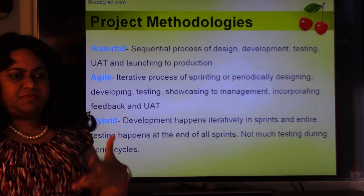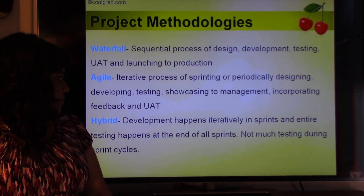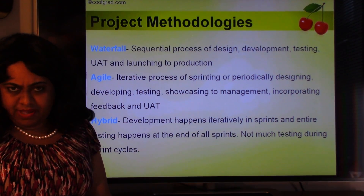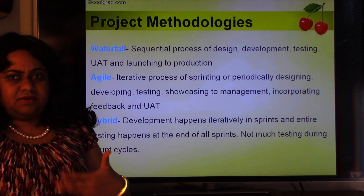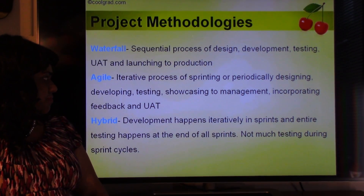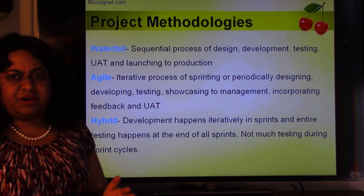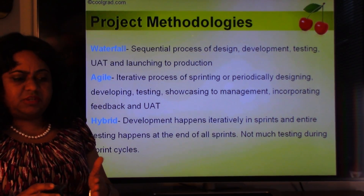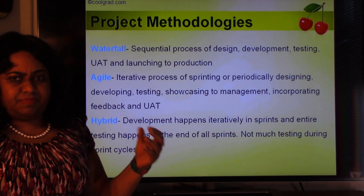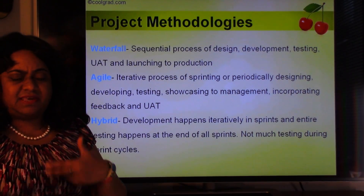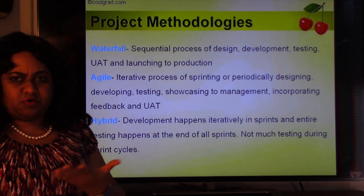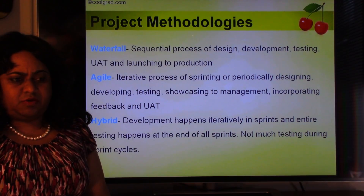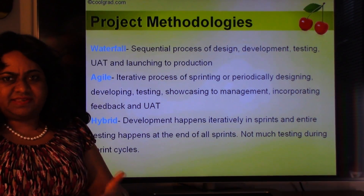Agile methodology is a recently developed methodology that is all iterative — the entire project implementation is done in cycles. There is periodic showcasing and periodic incorporation of feedback from the product owners. In an Agile project, there is something called a sprint, which can be one, two, three, or four weeks long. In one sprint, the team does some design, some development, some testing, and showcasing. At the end of the sprint, there is a demo to the business team so they can review, incorporate feedback, and make changes. The project is done iteratively — iterative development, iterative testing, and iterative showcasing.